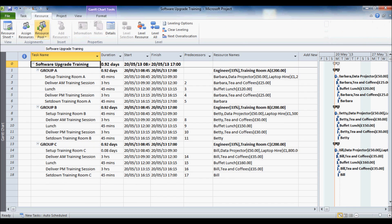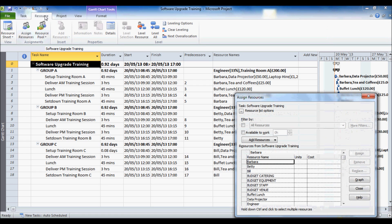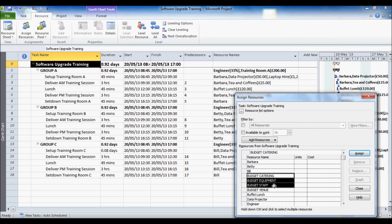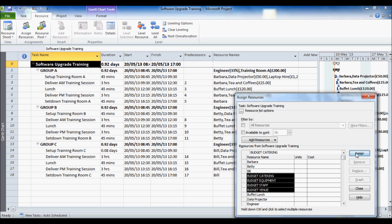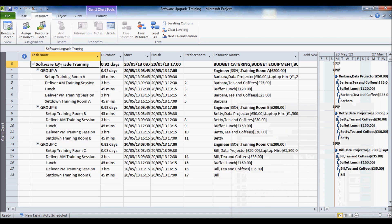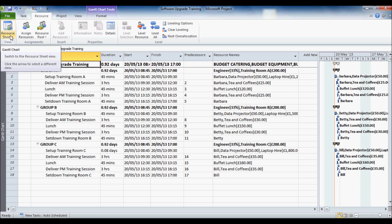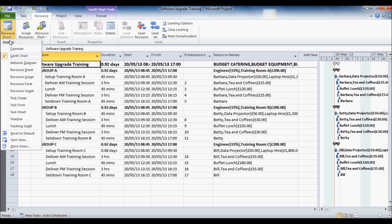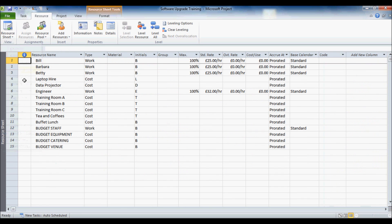And I am going to assign those resources. So resources, assign resources, there is my budget resources, see how useful it is to have them in a different case or something, something to distinguish them from the others. Click on ok. So they are assigned to that project summary task. Now back to our resource sheet.